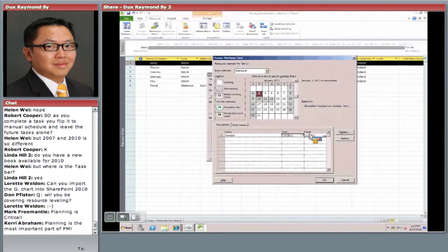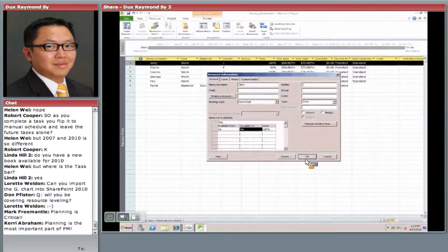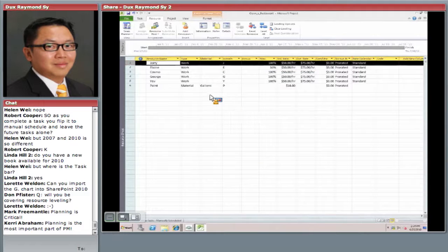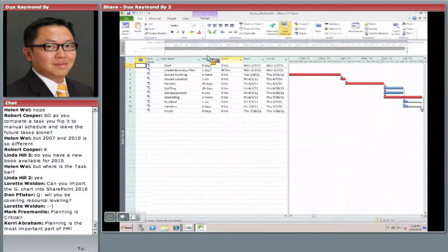He's going to take his vacation until January 28th. Okay. So I just did that. And the beauty is I tweaked Jerry's calendar, and I didn't touch anybody else's. This is Jerry's calendar. Okay. And then I can put people's sick days and availability and all that good stuff. So I can go through each resource. Cool. So after I've done that, let's say these are all my resources, I'm ready to start assigning tasks. Okay.